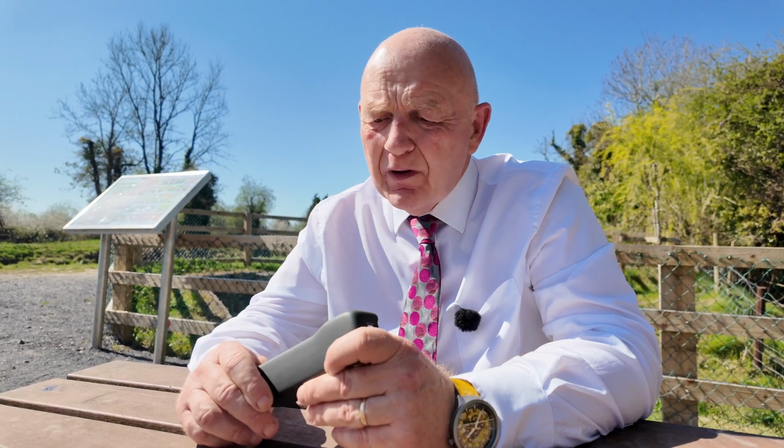Anyway, as I was saying about the snagging, your solicitor will be served with a formal notice. You probably will receive a call as well from either the estate agent or maybe the site manager, site clerk, and you'll have to go out and do the snagging. Now, it mightn't be a bad idea to get a professional snagger to go with you or to do a report for you. Obviously if it's your first new house, especially if you're spending big money, it might be no harm to get a professional snagger to give it a good going over. Then you let the vendors or the builder's representative know what imperfections are there, what you're not happy with, and they're to be rectified. And then you go back again a fortnight later, or 10 days later, or a week later, and you check that the work has been carried out.